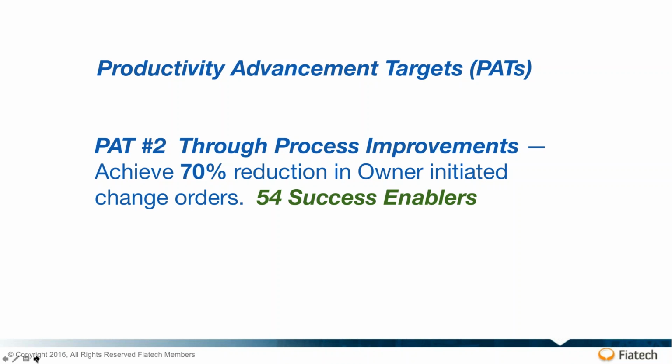And Rebecca, I think you mentioned how many pipe spools? I get the numbers wrong, so if you can turn yourself off mute. There's something like 18,000 pipe spools that he installed, and only like 6 or 7 of them had problems or something like that. I think it was about 15,000, or maybe it was 50,000. Now you caught me, I've got to go back through my notes. So 15,000. It was 15,000 connections, and there were 5 dimensional issues out of that.